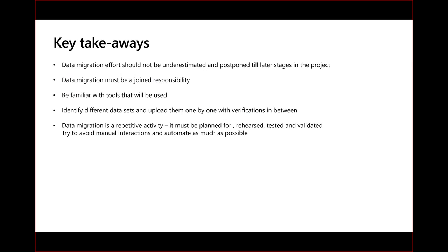Typically, the only person able to extract data from the legacy system is your customer. But on the other hand, knowing how to upload it into the new system is knowledge that you as a partner have, and that you need to bring. Bringing those two worlds together is a joint activity. Once you have uploaded your data into the new system, the validation of the data, of course, is again something that the business users from the customer need to be doing.